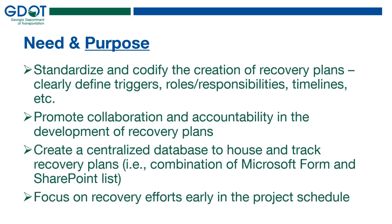Based on those needs, the scheduling team attempted to standardize and codify the creation of recovery plans, clearly identifying the triggers, roles and responsibilities, and timelines. We also wanted to promote collaboration and accountability in the development of recovery plans — making sure everyone's coming to the table. We wanted to create a centralized database to house and track recovery plans through a Microsoft form and companion SharePoint list. This process is meant to focus on recovery efforts early on in the project schedule when we've first started to slip, to attempt to get back on schedule when there's time to do so.